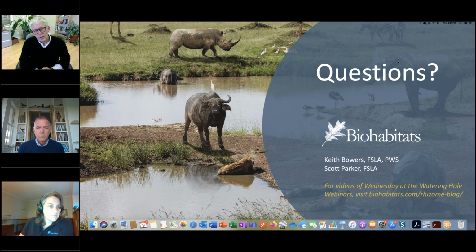Yeah, I think there's probably two components to that. One, some of the ideas that we're coming up with, like raising the promenade or the battery wall path, will be an initial capital cost to do that, but the long-term operations and maintenance will be no different than what it is now, right? Other strategies like the horizontal levee, if that involves raising a street and reconfiguring that park to provide that slope, then again, there's a lot of upfront capital improvement costs associated with that. But when you ratchet back and think about the long-term operations and maintenance, it won't be much different than maintaining the park now and maintaining the road now.